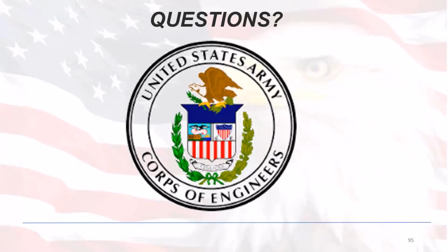And then one of the other questions was, if you import the SDEF file and the actual dates are different in the daily reports, will RMS give you an error message? RMS won't give you an error message, but it will let you know what data inside of RMS does not match the data in the SDEF file. So when you go to do the SDEF import in RMS, it'll show you what it's going to look like when you import that SDEF file. And anything in red will let you know that it changes, whether or not the data is the same, whether or not the data will be overwritten.